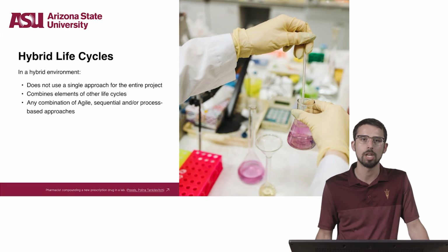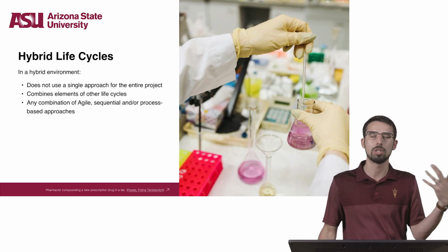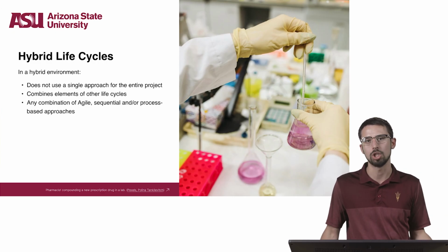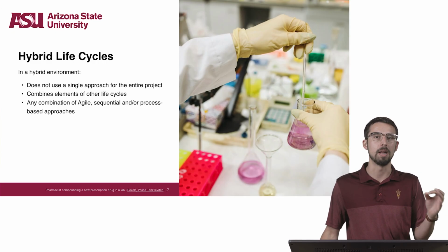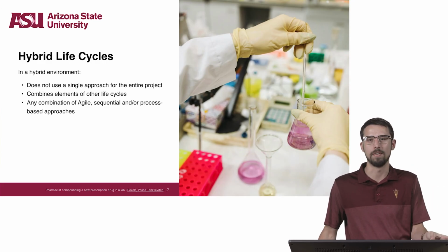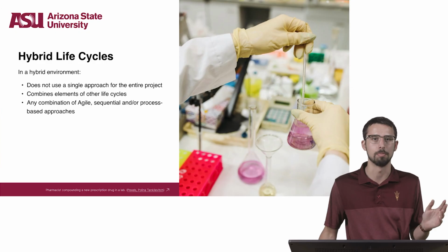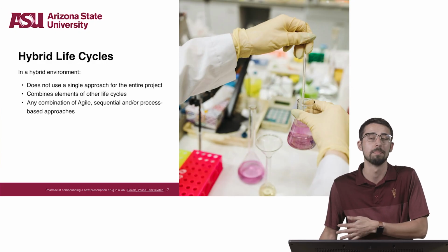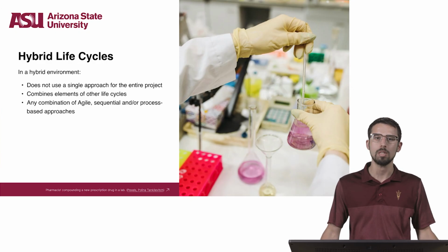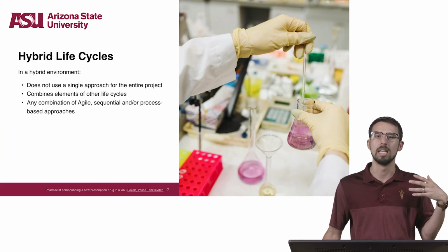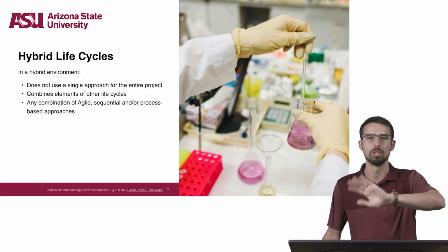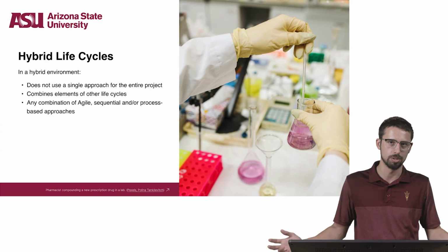And this approach can be used when there's uncertainty or complexity and risk in the development portion of the project that would benefit from a more agile approach, followed by a defined, repeatable rollout phase that is appropriate to undertake in a sequential way, perhaps even by a different team. So an example of this approach is the development of a new high-tech product, followed by a rollout and training of thousands of users.